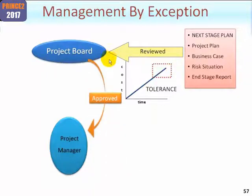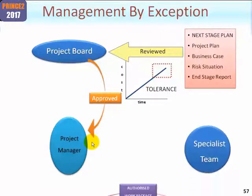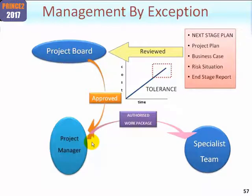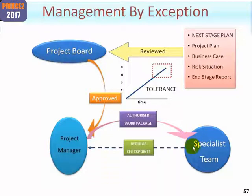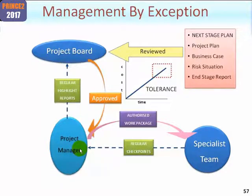The next stage plan is approved and now the project manager is tasked to manage the stage, first of all by giving out authorised work packages from the next stage plan. The specialist team need to agree to that and then work can commence on creating the specialist products. During that period, as laid out in the work package, the team will give the project manager regular checkpoint reports. By the same token, the project manager will give the project board regular highlight reports because of course we are managing by exception.